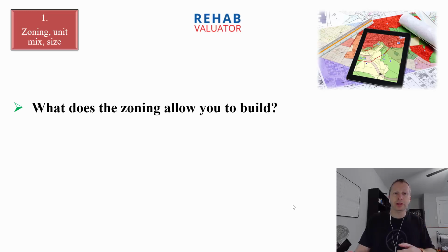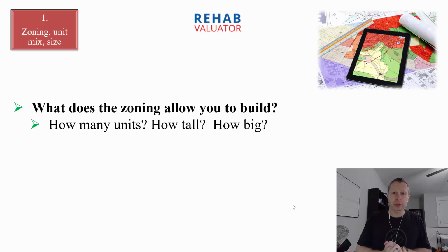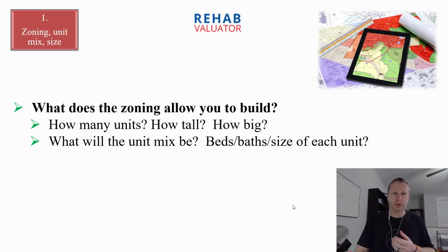What am I going to build? What does the current zoning allow you to build? How many units can you build? What is the height limit in the zoning? What are the setback requirements given the current zoning? What is the maximum footprint, floor plate of the building that you can have? You need to look at all of those things.